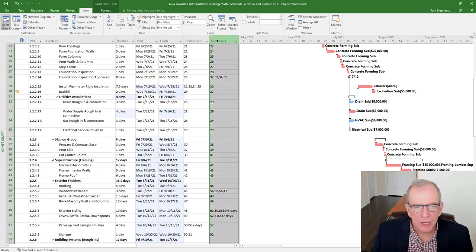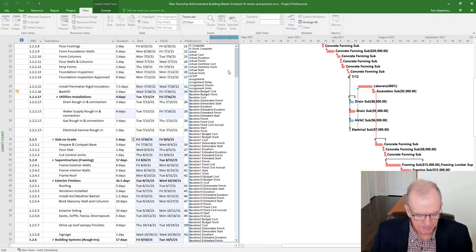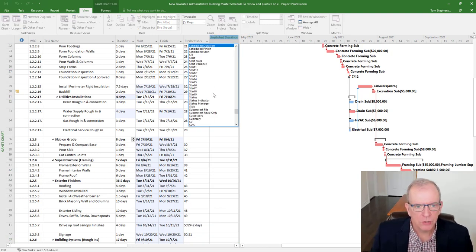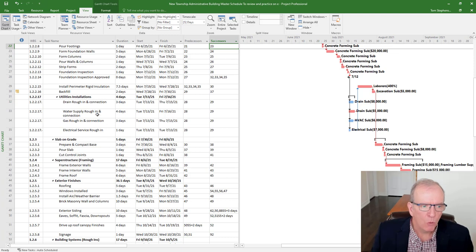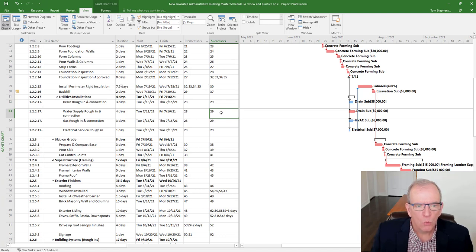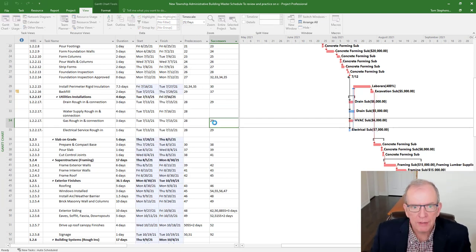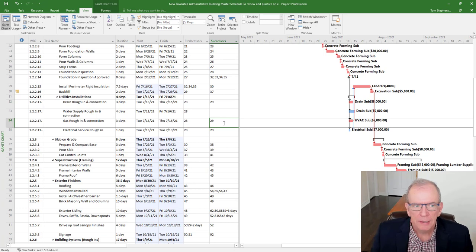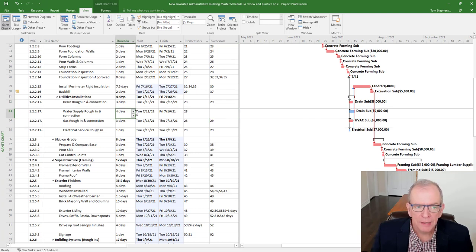And the successor task, and you might have to insert this column to see it, you can go insert column, type S for successor, that's how you insert a column. And you will see all the successors listed. So water supply rough in the successor activity is number 29, which is install perimeter rigid insulation. If I take that out and leave it blank, then it's just made something else critical. And this is not giving me the true finish date, yet it should be connected.